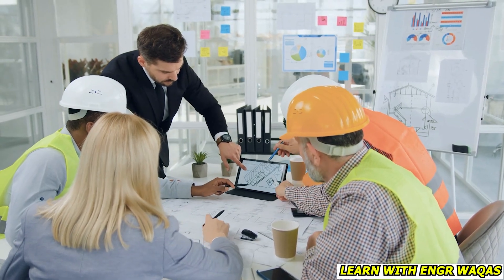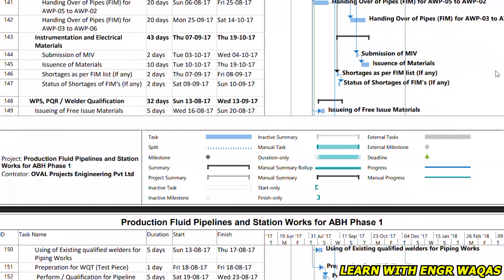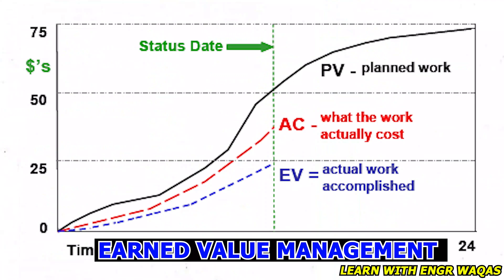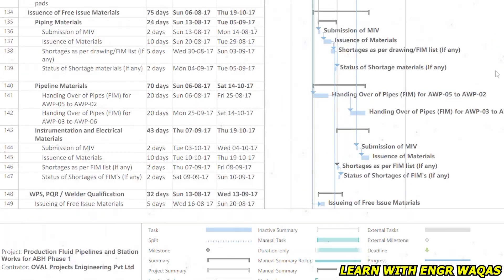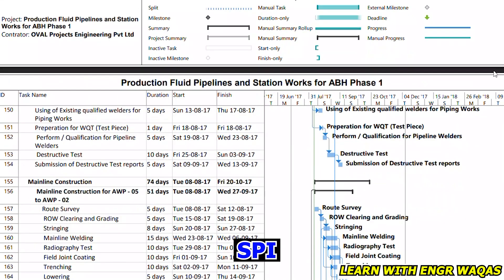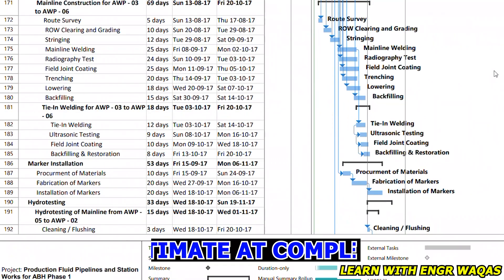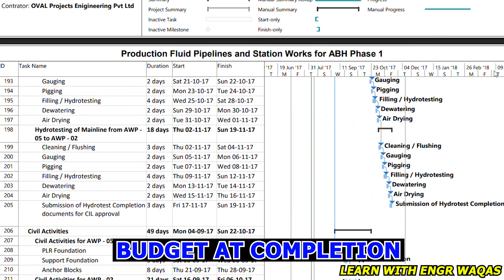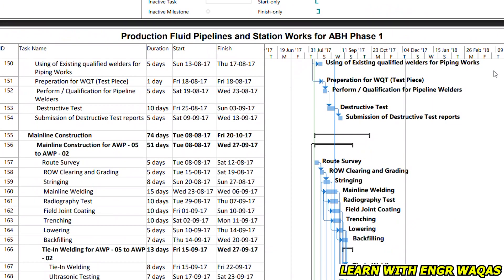Planning engineers must also implement Earned Value Management analysis to provide project tracking visualization — covering SPI, CPI, schedule variance, cost variance, Estimate at Completion (EAC), Estimate to Complete (ETC), and Budget at Completion (BAC). These tools give the planning engineer full control to drive project success.